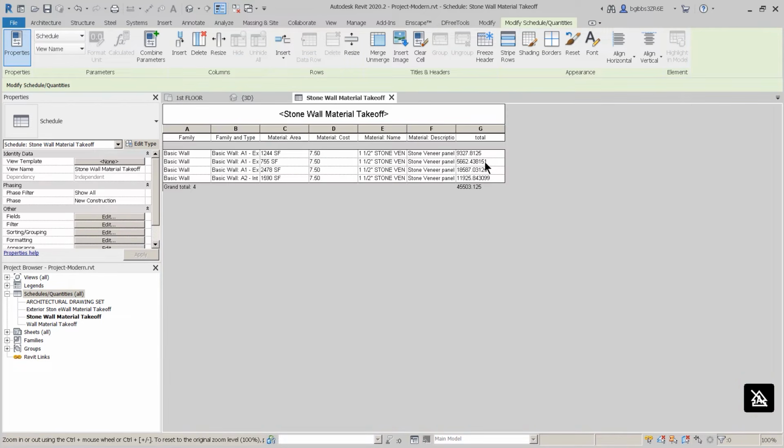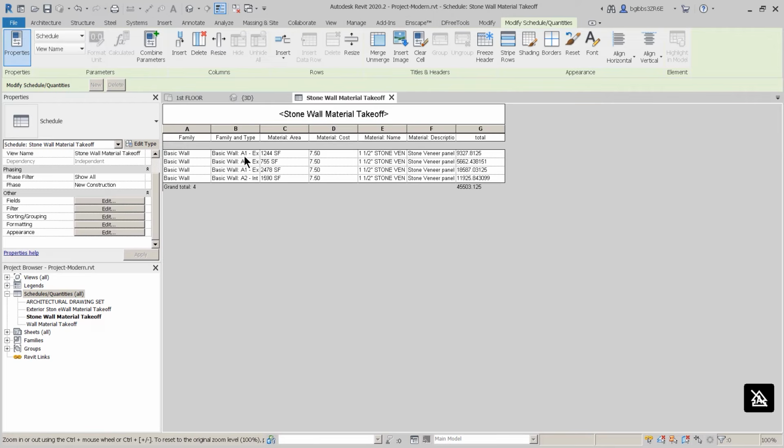By putting this together, we've made it easy to use the power of building information modeling to inform our design. So when you go and you've talked with either if you're a client or if it's your own house, you will be able to come back or talk to contractors before a project gets developed, so you can really start getting a price that you want and a design that matches in an intelligent way. Takeoff for other materials can be done in the same way that we've done for the stone material takeoff.